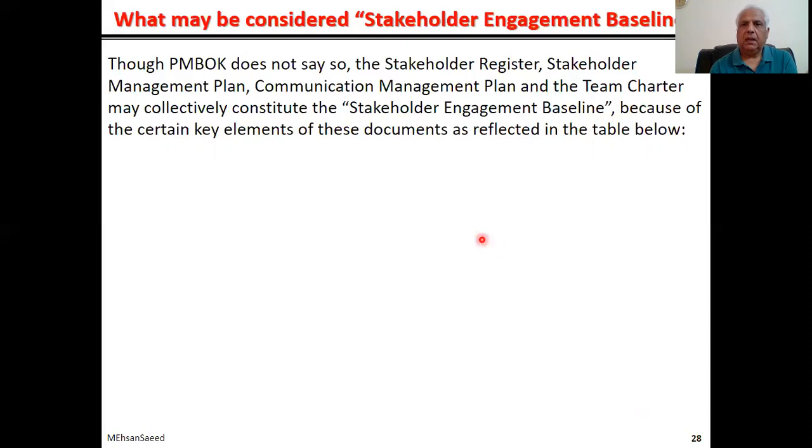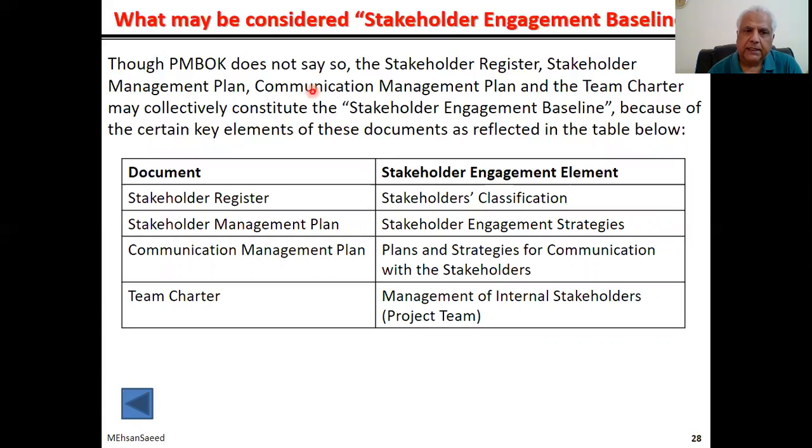the stakeholder register, the stakeholder management plan, the communications management plan, and the team charter collectively constitute the stakeholder engagement baseline. And the reasons for that are tabulated in this table. For instance, we require stakeholder register because that carries the stakeholders' classification based on their interest, based on their legitimacy, based on their power, etc. We require stakeholder engagement plan because based on these classifications, we devise strategies on how to engage a particular stakeholder.